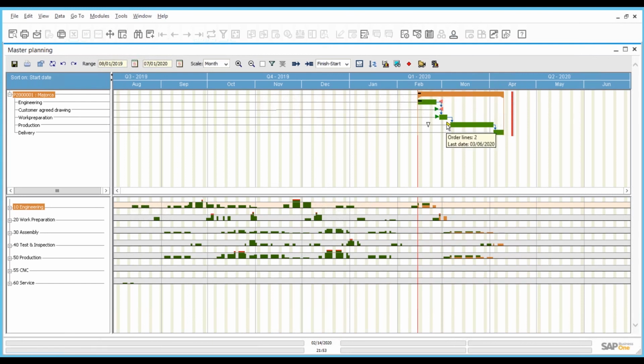You see a yellow triangle. In this yellow triangle, you have the order line, the purchase order and the goods received, and the white triangle tells us that there are still materials to be ordered. The black line in the activity and in the project is the progress on the project. If you look here, it's 16 hours, meaning 22% progress.